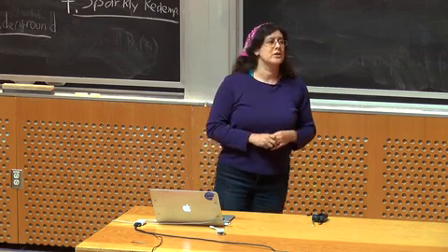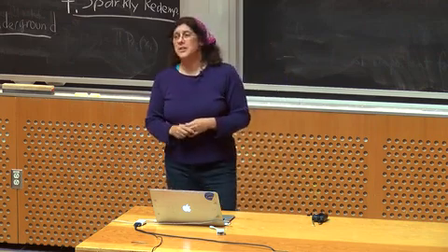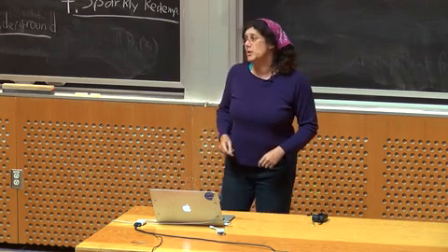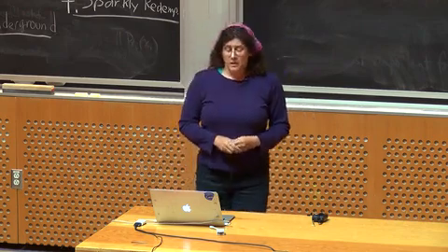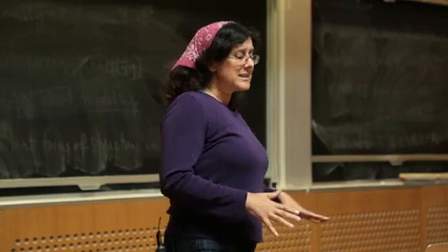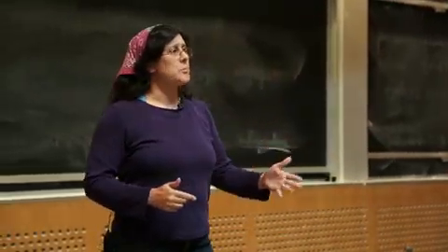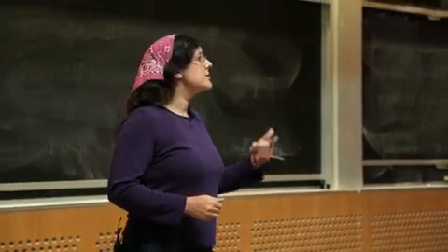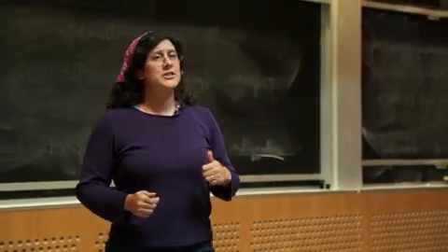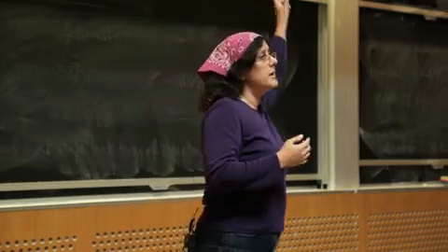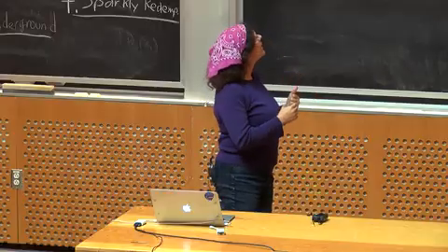Daily scrums are also actually called daily stand-ups because a lot of teams do them standing up in order to keep them short. Classically, it's time boxed at 15 minutes. For teams your size, 5 to 6 minutes is probably actually enough because all each person has to do is stand up and answer these 3 questions.